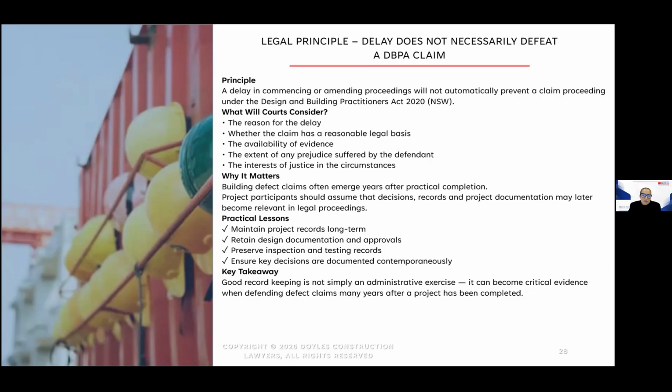Building defect claims often emerge years after practical completion, and project participants should assume that decisions, records, and project documentations may later become relevant in legal proceedings. And this is why it's important to maintain those project records, retain design documentation, preserve inspection records, and ensure key decisions are documented contemporaneously. So delay doesn't automatically defeat the DBP claim. The courts will weigh the reason, the merits, the evidence, and any prejudice. So keep your project records long term.